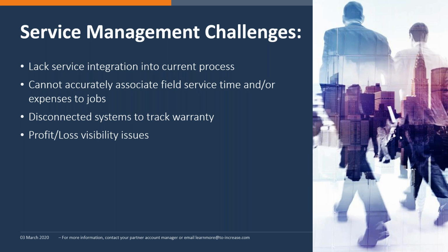So some of those challenges include lack of service integration into your current process. Could be cannot accurately associate field service time and or expenses to a job. Many times after a job or a project is delivered, a service representative has to go on site to do the final installations and programming of that particular machine for that project. All those costs should still relate and roll up to the project.